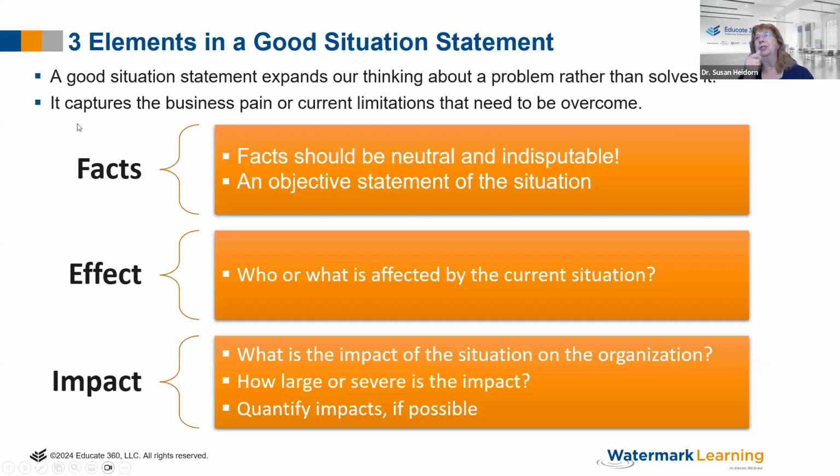And so when you write a situation statement, one of the key things is, because sometimes I've seen situation statements like, well, the customers are kind of unhappy or they're complaining a lot or employee morale is going down. It just doesn't give you enough data. Or, well, they're not going to support this application, the software anymore, so maybe we should do something about it. That just doesn't really tell me anything. Doesn't tell me how big it is, do I need to re-up it? Do I need to get a different software? Could be lots of reasons why our customers are unhappy.